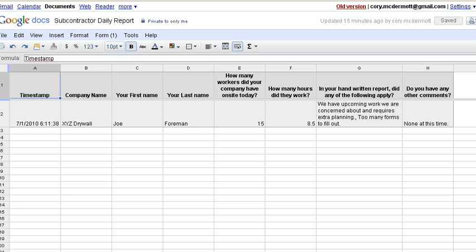There are a lot of clear benefits to this kind of approach: we can get our actual manpower data from our subcontractors and compare that back to a baseline schedule. We can see the results of discussions we've had with management of our subcontractors to see how manpower changes, and just try to catch any upcoming issues, get some red flags called out to us, where we have upcoming work that requires special attention.